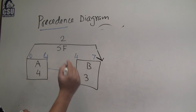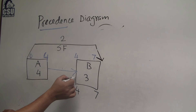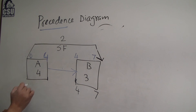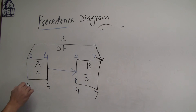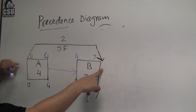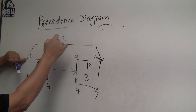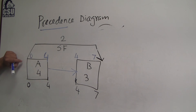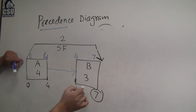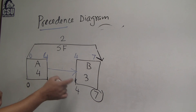Going back for the backward pass: it finishes at seven, takes three days. Following the finish-to-start relationship back: B's late start is four, A must finish so B starts — A finishes by four. If B starts at four and finishes seven, checking the start-to-finish constraint: B finishes seven, which is more than two days from A's start of zero. So both conditions are satisfied. Writing late start zero and late finish seven satisfies both this condition and this condition.